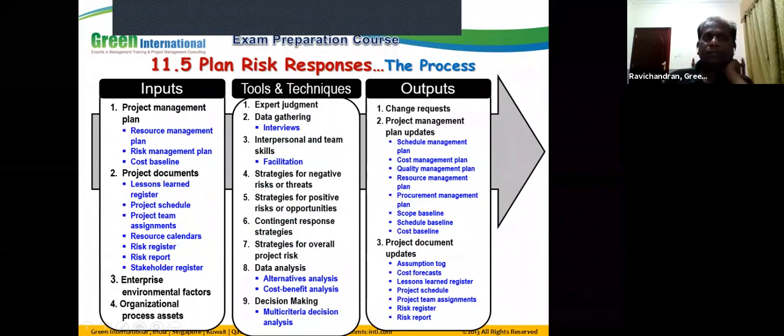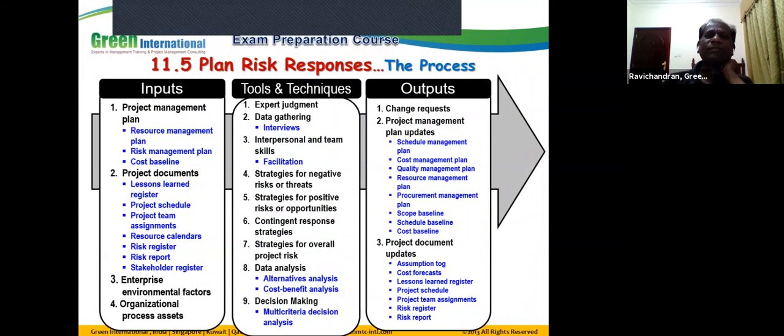So when we are entering the contract with the sellers, we are putting the contractual obligations as conditions. Most of these conditions are a translation of risk action plans into contractual conditions, to make sure the seller will be managing this risk appropriately to achieve the project work within our plans. So these are the three actions we need to do upon completion of this process.